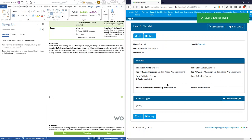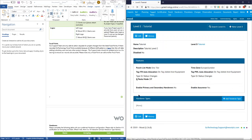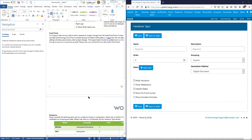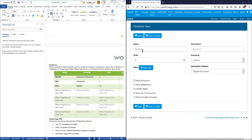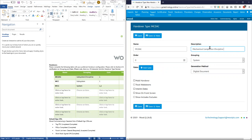That is most of the level setup done. However, there are a few more things we need to do: one is to configure the handovers, and after that we want to configure the default sign-offs as well. Let's start by configuring the handover types. We'll go add handover type. The first one we've got is an MCDAC — that's a Mechanical Completion Acceptance Certificate — and that's our first handover.